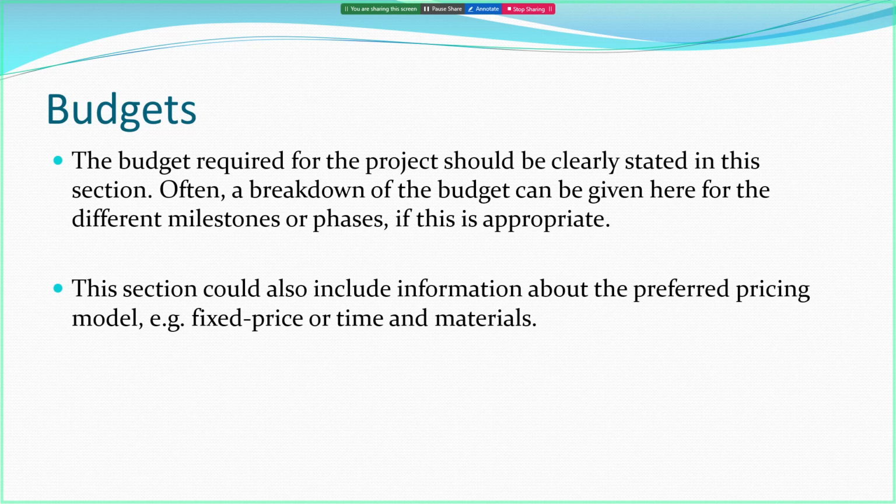So you as a developer, organization, will want a regular payment from the client as you progress through your milestones, and you as a customer, an organization, will want to see those milestones being met before you make a partial payment as per the financial statements and agreed targets in the scope.